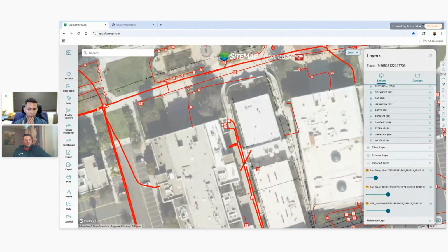So once we were able to kind of get it mapped and see that it ran into the building right there, we turned that data over to the structural engineer, the architect, and then the electrical engineer, and they kind of confirmed that, as well as with the historical drawings that I gave them, and we were able to come to the conclusion that the elevator pit that we're going to have to excavate will miss that conduit package.